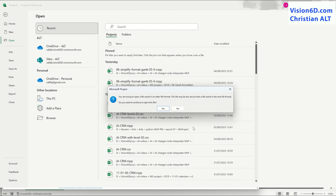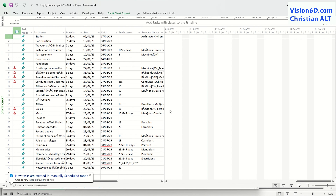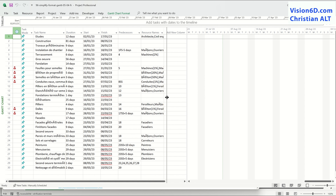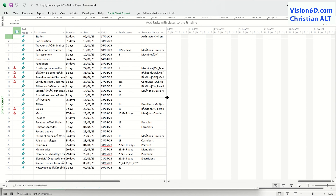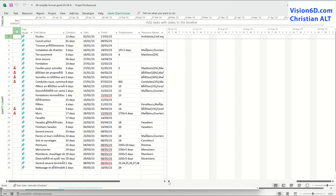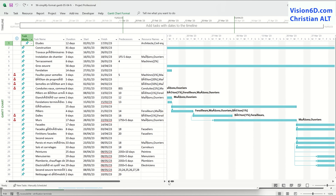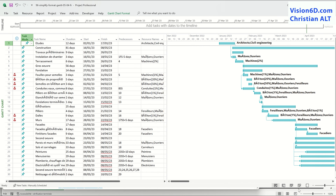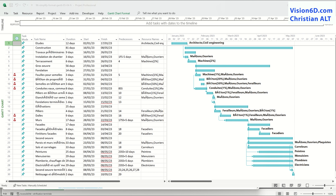Now is really the moment when MS Project is importing the data, and we see that it has imported all the tasks, durations, start and finish dates, predecessors, and even the resources. Exploring a bit further into the Gantt chart, we will discover that the diagram is present. We can see that each task is represented and on the diagram we also see the resources, as well as the links with predecessors and successors.